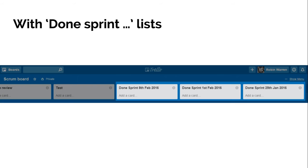So every time you start a new sprint you create a new done list, the old ones move off to the right, and then as the ones on the right become less relevant, you can archive them or move them to a separate board in Trello, so they're still accessible but they're not cluttering up your board.